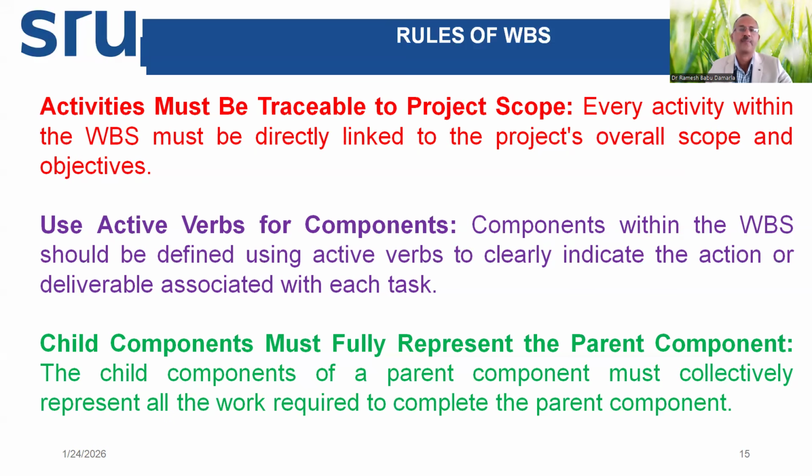Second important rule is using active verb for each component. Means while writing WBS breakdown for each element, we should add a verb. Use an active verb to clearly indicate what action is to be done, which is associated with each task.